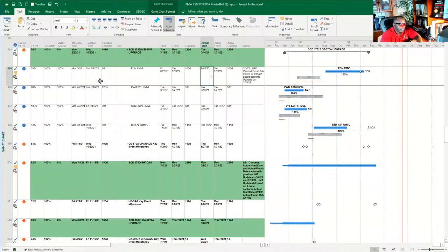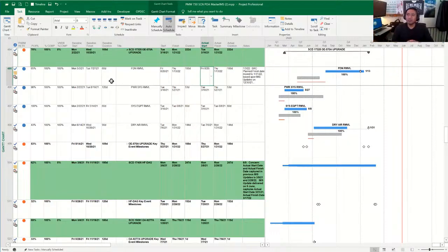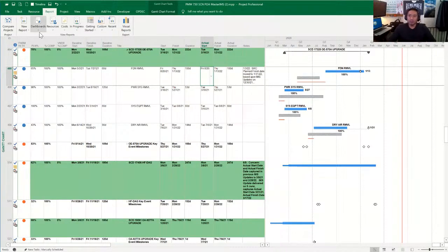Mm, good stuff, Darrell. So let's say your typical project, when you have these weekly or quarterly or whatever the period is kind of meetings, are they looking to see something more summary level than this? Or are there other reports that they request? And what would some of those reports be? The main reports that stakeholders love to see are your plan versus actuals, meaning your remaining work and your cumulative work. So you could use the reports tab to your advantage by having a burn down chart.